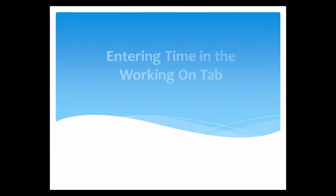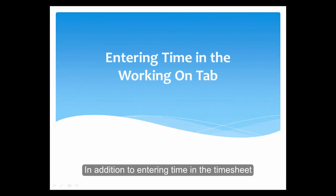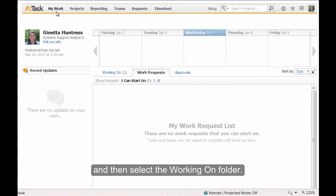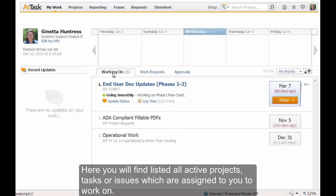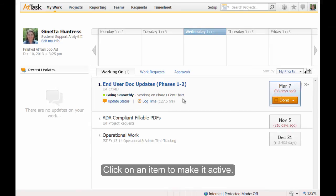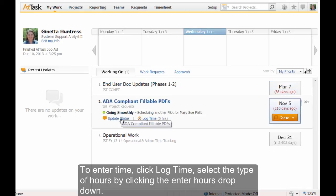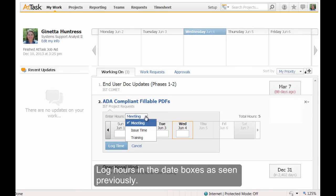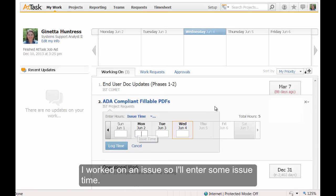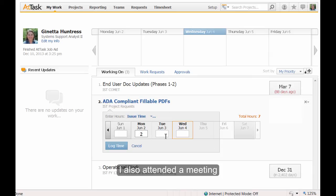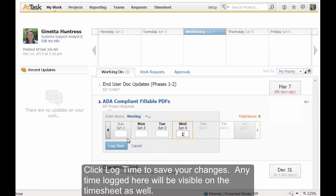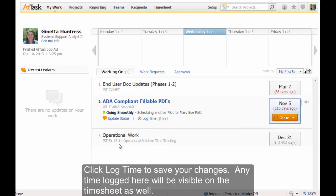Entering time in the Working On tab. In addition to entering time in the timesheet, you can also log time in the Working On tab. Navigate to My Work and then select the Working On folder. Here you will find listed all active projects, tasks, or issues which are assigned to you. Click on an item to make it active, then click Log Time. Select the type of hours by clicking the Enter Hours dropdown and log hours in the date boxes. I'll enter some issue time, and since I also attended a meeting regarding this issue, I will enter an hour of meeting time as well. Click Log Time to save your changes — any time logged here will be visible on the timesheet as well.